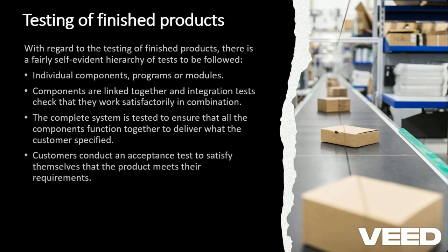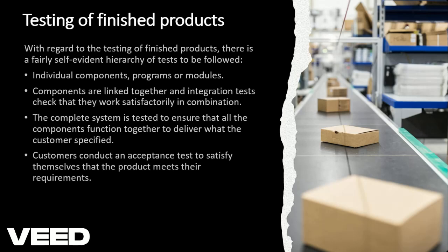And also check for requirements adherence. That is important as you are doing the system check. Then the customers again can perform user acceptance testing. This is where they use the finished product to sign off on whether or not it meets their requirements. And only after that is done do you go ahead to install it in the user environment. So user acceptance testing is a contractual activity where the user legally signs to say this system that has been produced adheres to the requirements, is what we wanted, and then they are able to fully utilize it after you install it.